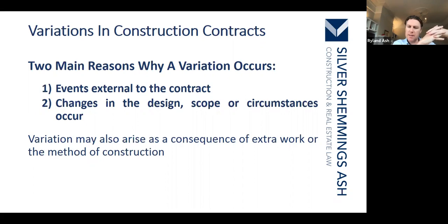It seems likely to me that the coronavirus is going to be deemed by the courts to be a force majeure event. But that doesn't help a contractor or subcontractor when they're looking to claim loss and expense under the JCT, because there's no right.